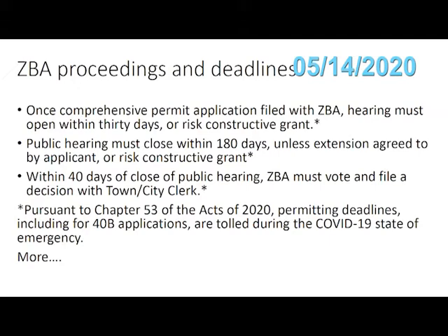In order to open the public hearing, as the board knows, they must advertise 2 consecutive weeks, 14 days prior to the hearing. So that normal process, like a special permit or a variance, takes hold. We now open the public hearing. Now, could the applicant request an extension of time within which to open the public hearing? Yes, of course. And that request should be filed with the town clerk, and then it's continued to a date certain. But let's assume, for argument's sake, that there's no request for an extension, or no extension granted. So day 1, I file.